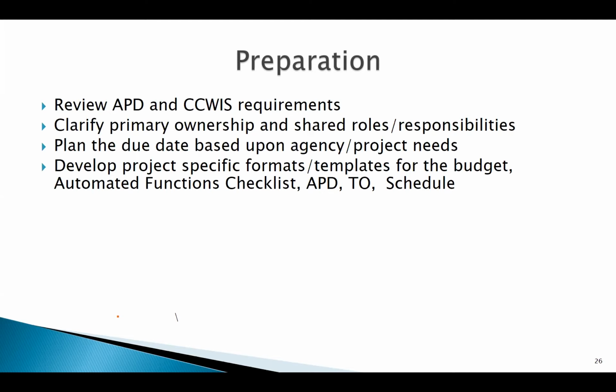for my APD. So typically, your budget needs to run for a 12-month period. But we do encourage you to think about what 12-month period makes the most sense for you. So you should consider when your state budget process is done. It's very helpful to know how much state money you have for the project before you need to do your APD. But other things you might want to consider: if you have other federal audits going on, if you have state activities or audits, other projects, things that are going on,